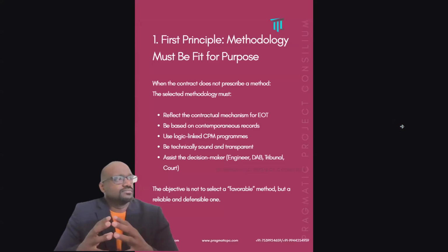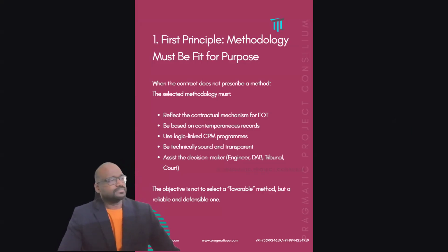So what is the first principle? The methodology must be fit for purpose. When the contract does not prescribe a method, it shall reflect the contractual mechanism for EOT. It should be based on contemporaneous records. This is very, very important. It uses logic-linked CPM programs. The delay analyst or the planner who is making the delay analysis must be technically sound and transparent, and they have to assist the decision makers such as the engineer, DAB, or tribunal.